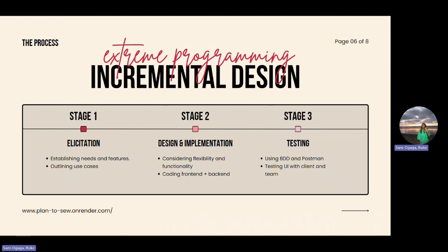Because it's a pretty big project, the scope is huge. So the way we divided it was based on stories. We divided it every week. We have a meeting with our client and she would pick stories for us to work on, and we would kind of focus on getting that delivered until the next meeting.